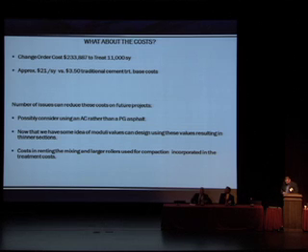Now, what about the cost? Because it was a change order and because it was done, our contractor wasn't prepared for it. I think we paid quite a bit higher cost per square yard than we traditionally do. It came in at $21 a square yard versus our traditional $350.